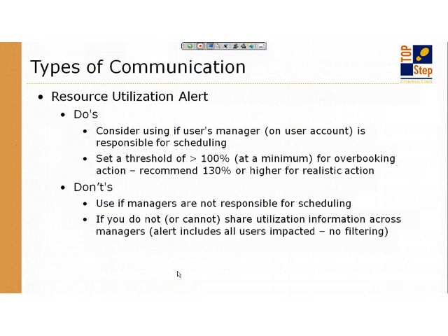There is one other type of alert, and it's called the Resource Utilization Alert. It has good intentions, but it is a bit limited in how you can set it up. If you've ever wondered what it looks like, be careful turning it on, because I'm going to tell you why in just a second. If you do turn on the utilization alert, what it does is it will look for a defined period in the future to see how many people have exceeded a defined threshold.